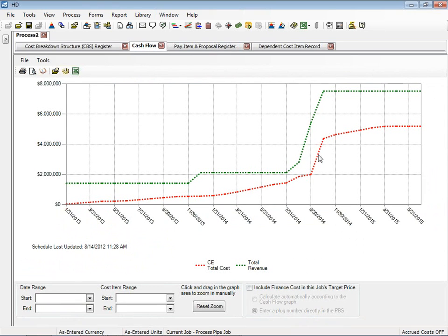Our cost is still the same, right? But now, having renegotiated the payment milestones, we can see what that does to our cash flow, and it's looking a lot better. Obviously, sometimes your payment milestones are fixed and you don't have control over them like I just did, but at least you have visibility into what our cost looks like in relation to the revenue.